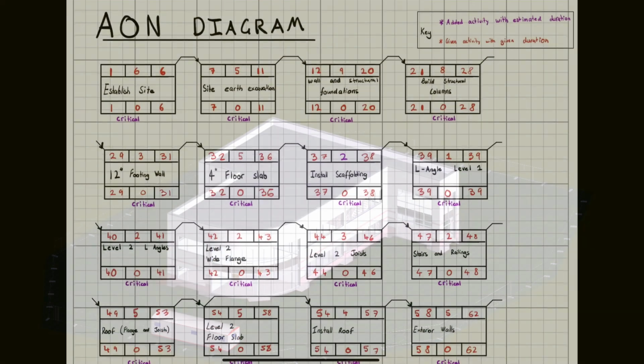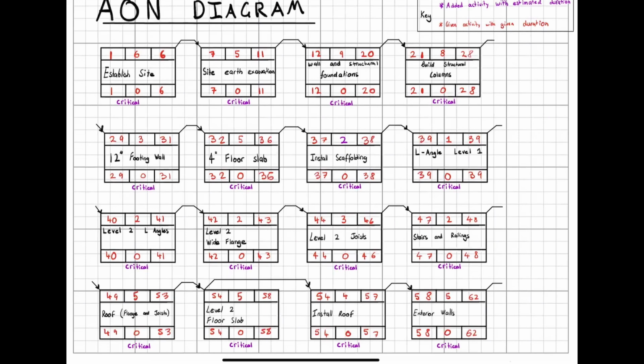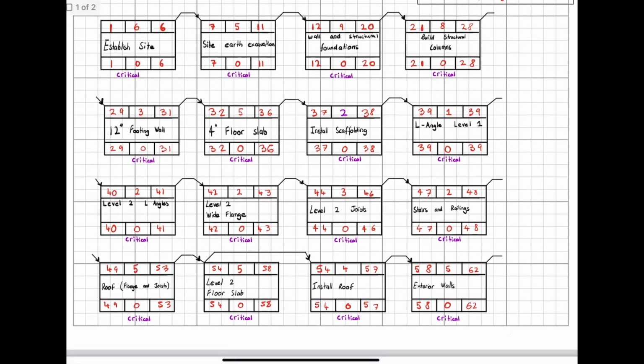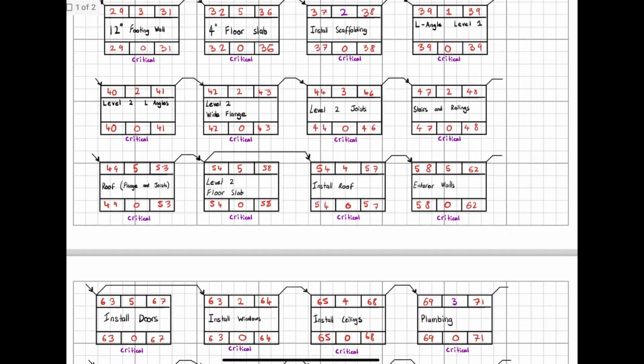My name is James, and I was a 4D timeliner for this project. One of my roles was to create the Aeon diagram. This involved combining tasks where possible and making decisions about the start to finish, finish to start, and other relationships between